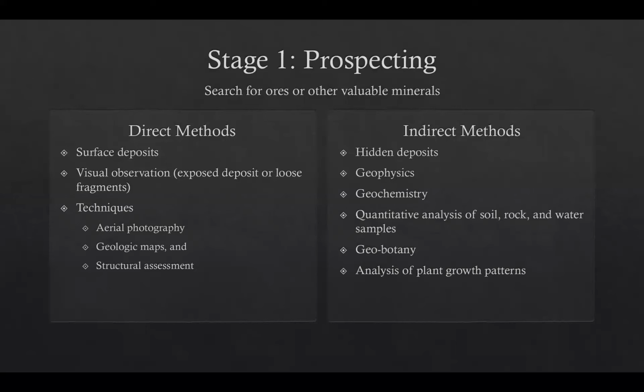The prospecting stage usually takes 1 to 3 years and it costs approximately 0.2 to 10 million, or 0.05 to $1 per ton of the deposit, based on the area and quantity of the deposit. It can be more or it can be less, but this is just a guideline or general information about prospecting.